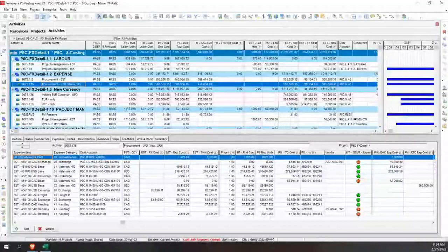And we can see in this example, our at completion is quite a bit higher than our budgeted cost. Okay, so that would start to influence the at completion for the P6 value, and it'll influence the at completion total automatically as you do the updating.